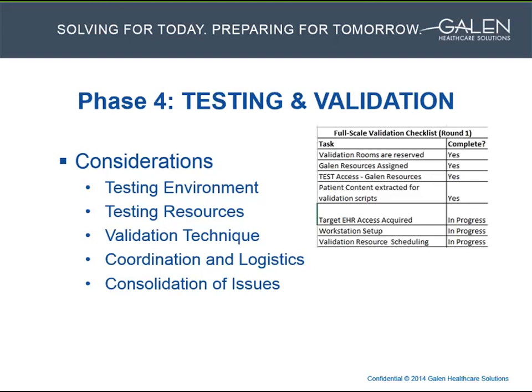Testing location can also be something difficult to coordinate. We recommend that the testers not be at their personal desks or offices so they aren't distracted during testing. We often suggest setting up a temporary area or maybe repurposing a training area to do the testing. Scheduling rooms and setting up the testing area may also be difficult due to space constraints, so make sure you schedule this early on.